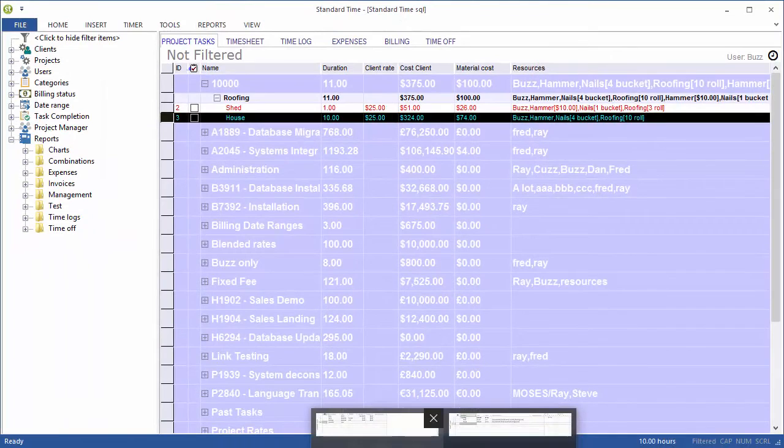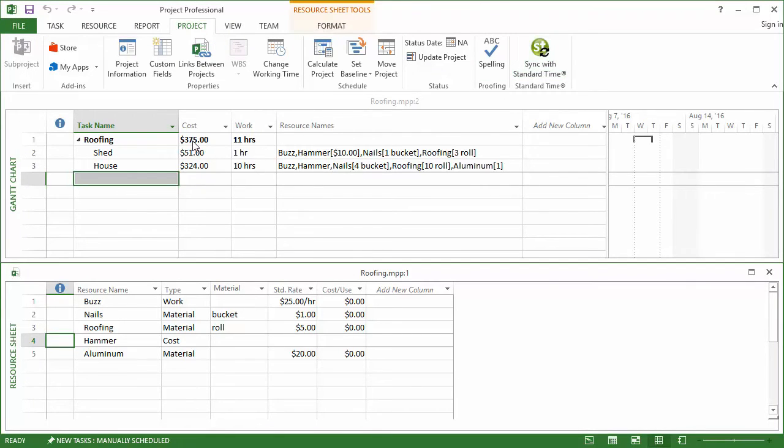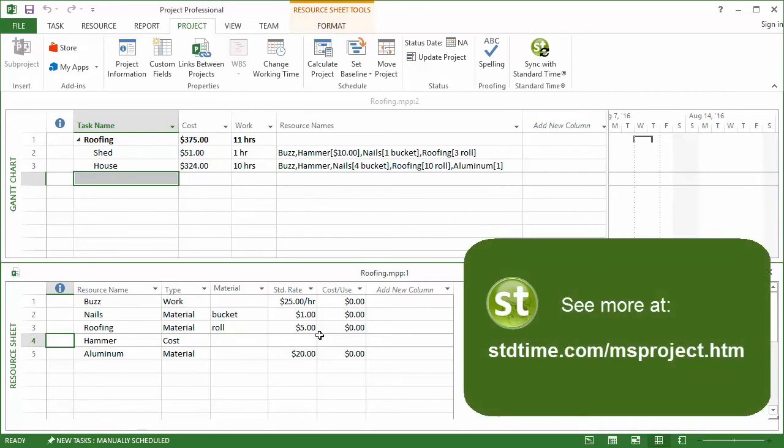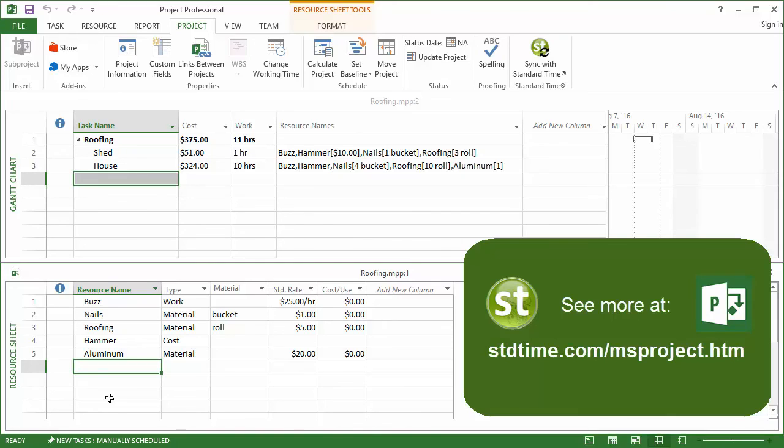Back to Microsoft Project. Click the sync button and we're up to $375. You see the roll of aluminum flashing assigned to this task and then down at the bottom you see that material added. This is a way for the actual end user to have some input on the project that the project managers have set up. The materials are going to go down to Standard Time, the end user will make some updates, and then they will travel back up to Microsoft Project when you perform a synchronization. That is how materials and costs are transferred between Standard Time and Microsoft Project.